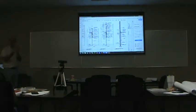And we've got front wall to work on this particular set of planes, you've got rear wall to work on. We got another activity that can go on down here once the roof is complete, and that's called exterior block paint. Rear of the building is painted block. The only thing that requires to be done is a roof beyond the building. So you can paint the back wall, at least get block fill on it. Keep water out of the building. Doesn't have anything to do with sheathing on the front, does it? They're not related activities.